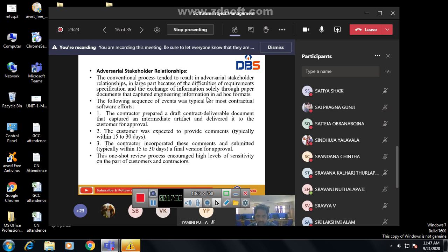So the following sequence of events was typical for most contractual software efforts. First, the contractor prepared a draft contract deliverable document that captured an intermediate artifact and delivered it to the customer for approval. So the contractor prepares some document.